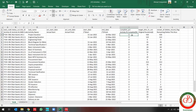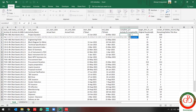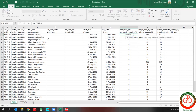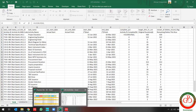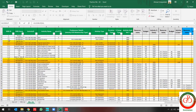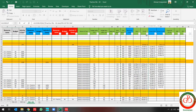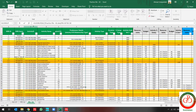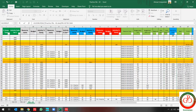First of all, I need to update the activity percent complete. So I use VLOOKUP for activity percent complete in order to move data from my other sheet to this sheet. This is my activity ID and I want to move the activity percentage completed from this sheet to my export file.